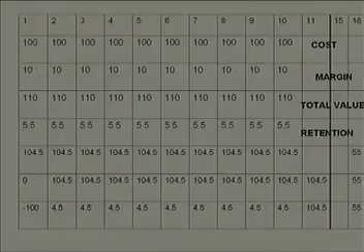Now, I have assumed 5% retention value. That means, whatever bill I am submitting, my client is going to deduct 5% of it. Now, 5% of this works out to 5.5 lakhs, because 5% of 110 will be deducted by the owner from every bill, and after 6 months of the practical completion, that means at the end of month 16, he is going to give me all my retention money.